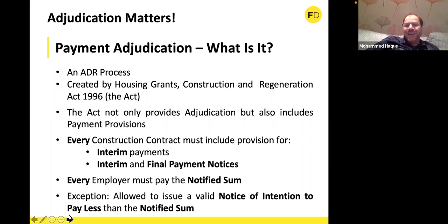And the payment notice is the key document in which the entitlement and the obligations are spelled out. So that's a key feature. That's an obligation on the payer, or if the contract says, on the payee to issue to get his entitlement. And that's a fundamental breakthrough in the whole system. And if a party defaults, there are provisions for that as well. So in other words, the Act guarantees that payments are made in installment. How many installments is a matter of the agreement of the parties.